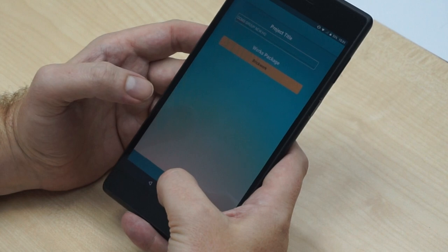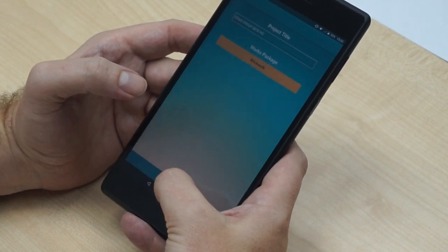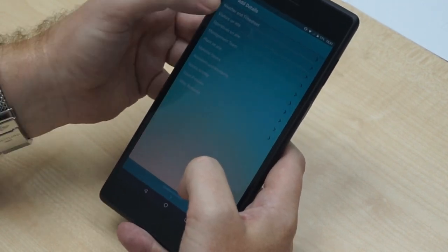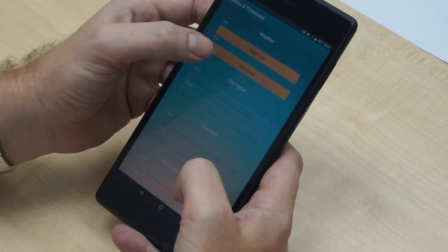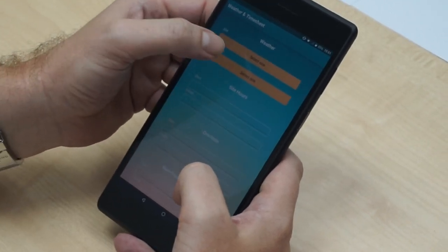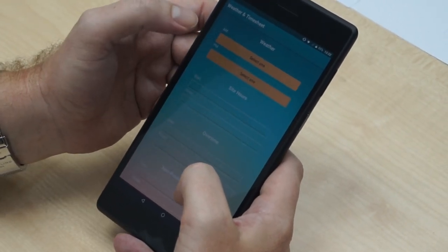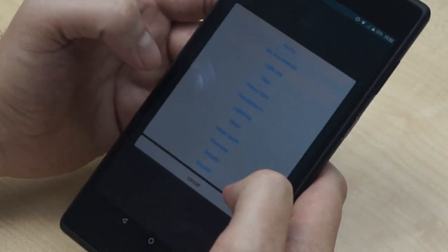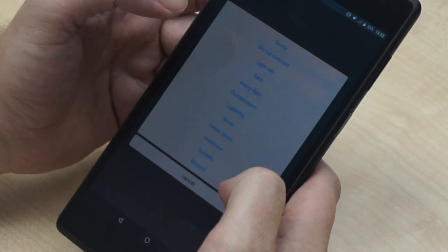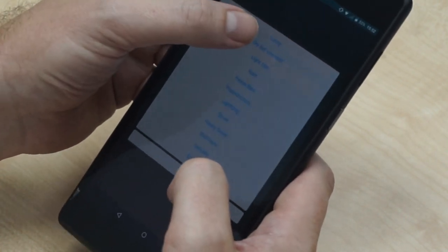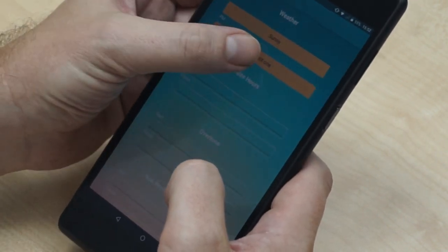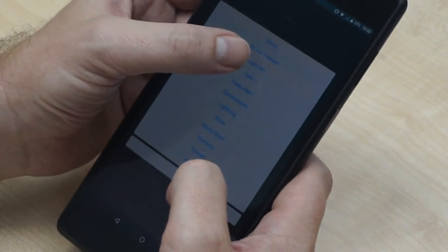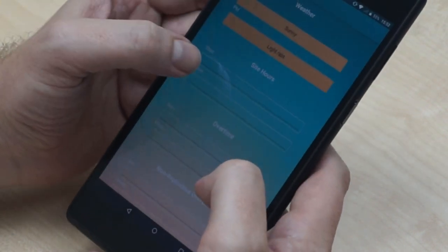We then move on to the site diary and all the salient details that it'll keep. Weather and timesheet. To bricklayers, the weather is very important, because obviously there's downtime for frost, snow, etc. So this is pre-populated with the weather conditions that we envisage. Fortunately today it's sunny, but in the afternoon we have light rain. Thankfully it doesn't slow us down.